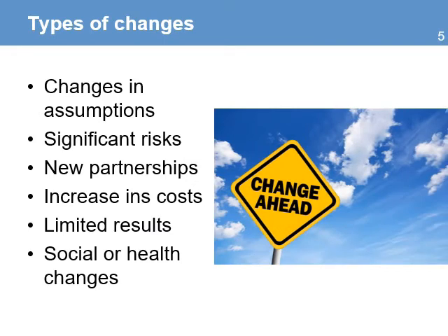Changes can come in different types. These are some of the most common. Beneficiaries' assumptions about their participation have changed. You need to stop activities and replan. A significant risk forces a change in the schedule of activities. You need to reschedule the work.